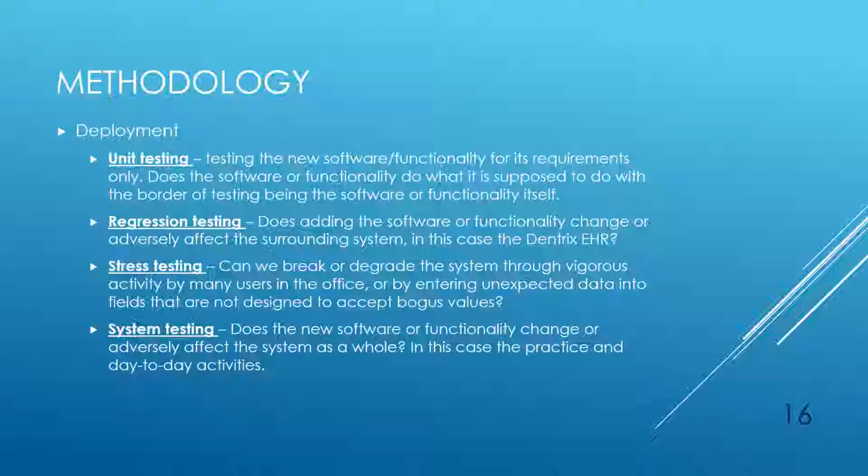The next step after design is deployment or implementation. The Dentrix ePrescribe module comes with very detailed step-by-step instructions on implementation. Now, as an IT project manager, I'm used to having my teams implement upgrades, changes, or new installations of software and functionality into a test or development environment that mirrors the production environment. In a test or dev environment, teams can work out bugs and perform several types of tests on new software functionality.